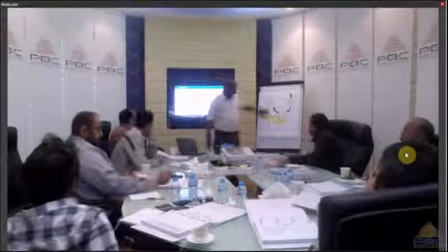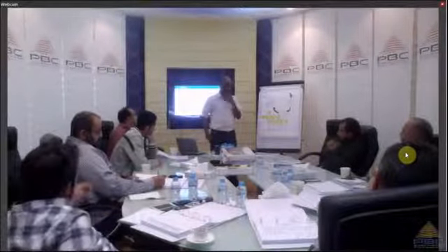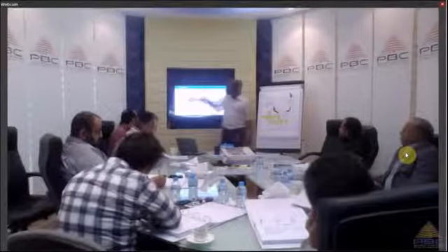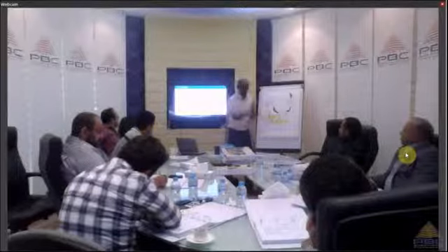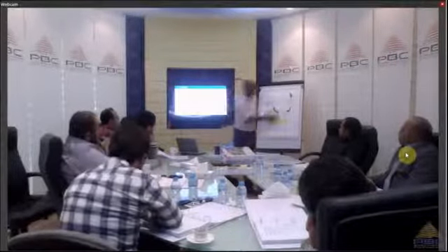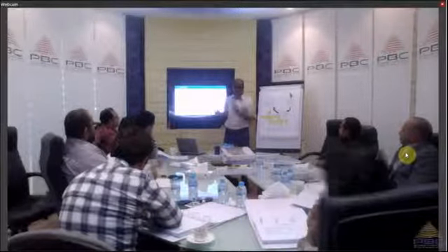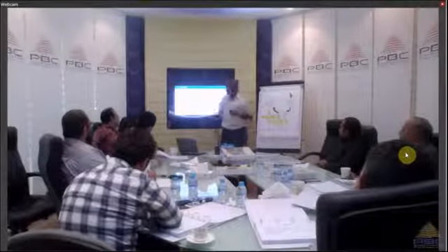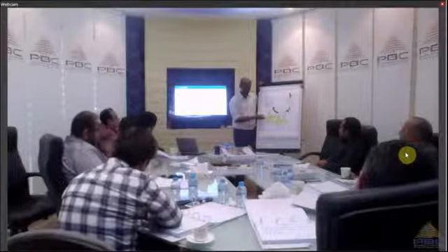A WBS itself, we have types of WBSs. This type is called using major deliverables, because I'm using the major components of the aircraft. But we can compose the WBS using other techniques. Like you guys do WBSs based on project phases. Most of the WBS in construction, what do you have?